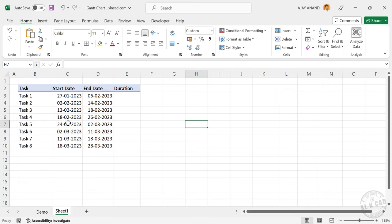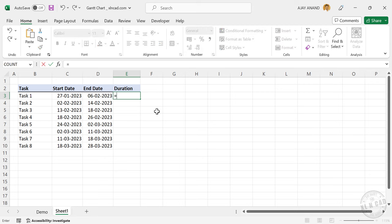Second column has the start date of each activity. End dates are in the third column. Now to calculate the duration of an activity equal end date minus start date plus 1.